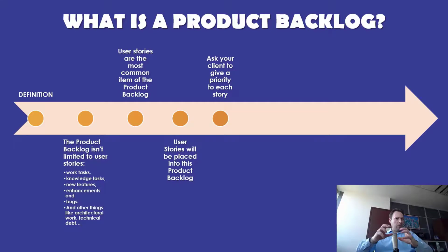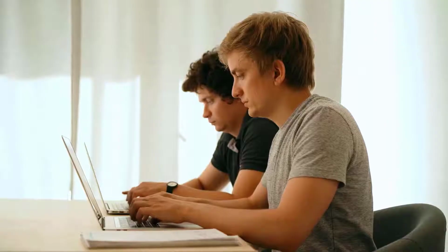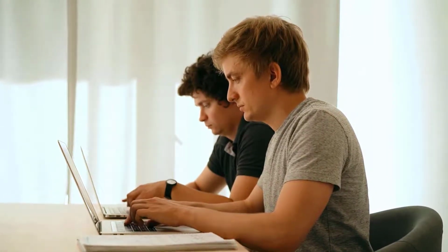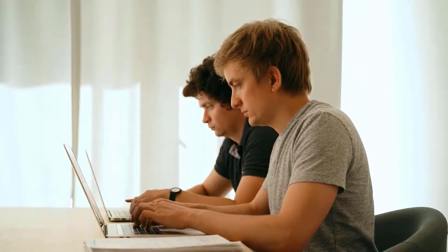And this will jumble up your user story identifiers, but that's okay. The user story identifier is more a tracking mechanism than a sorting device. And this gives a developer a sense of what's important for them to develop, and it also gives them perspective and focus. All they have to worry about is pulling tasks from the top of the backlog.